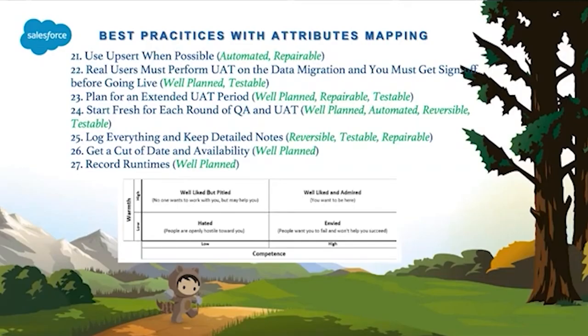So this graph, whatever I have placed here, the small chart that talks about customer sentiments. This is a general project management rule of thumb: you have to identify the list of stakeholders, both internal and external, and categorize them under what kind of user sentiment they will fall under.